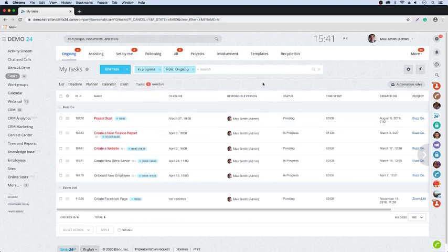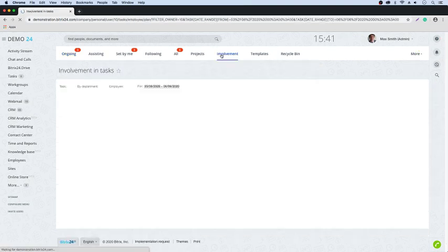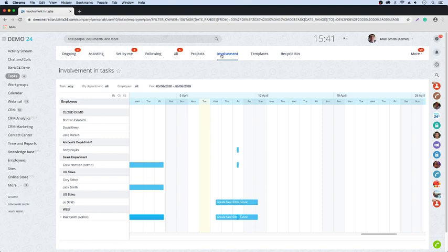I mentioned one of the areas when we were setting a start date and an end date to a task. What that allows you to do is see when users are booked out for particular tasks. And this, again, gives you quite a good way of your resourcing. So I know that one of our developers, for example, is booked out from the 10th of April until the 15th. He's blocked working on a particular client's project. So giving a task a start and end date therefore allows you to see when.